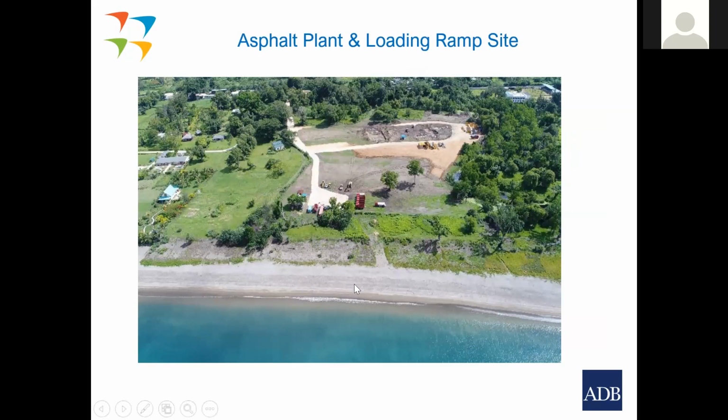We've got a beach here where he was going to be offloading his aggregate and putting a temporary wharf or offloading platform. We have a stream running around the edge of the site and going out to sea with a riparian area that was potentially going to be damaged. So he had to address all of these issues in preparing his site-specific plan for the asphalt plant.